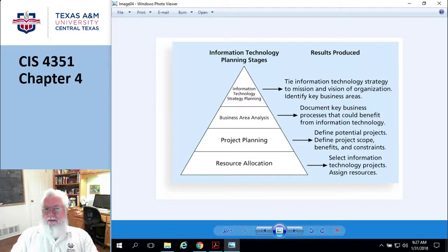As I have said repeatedly, there has to be a valid business need in order to do something. You can't just do something because. Okay. So the techniques you use could be something as simple as some financial measure. I've got 5 or 6 projects laid out there, and now that I've determined that these all align with my business, maybe it'll be a simple return on investment or net present value. Something that will give me a way to rank the projects and say, okay, I'm going to go with that project before I go to this project.